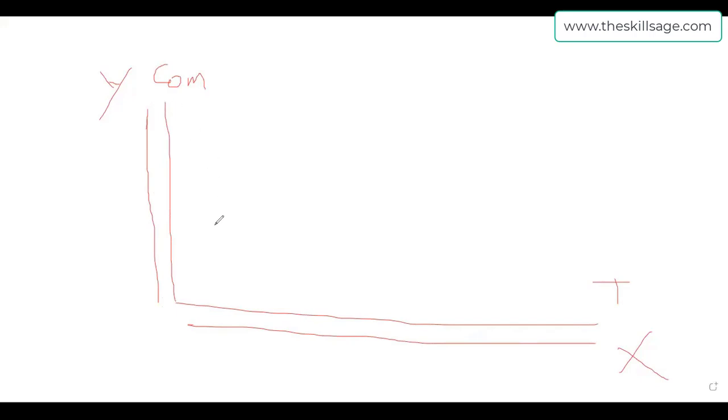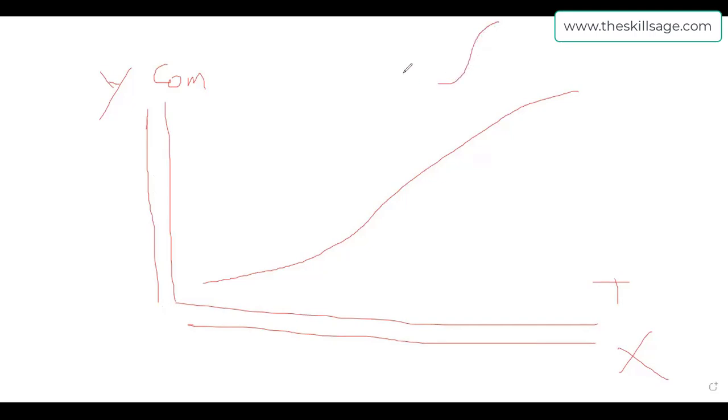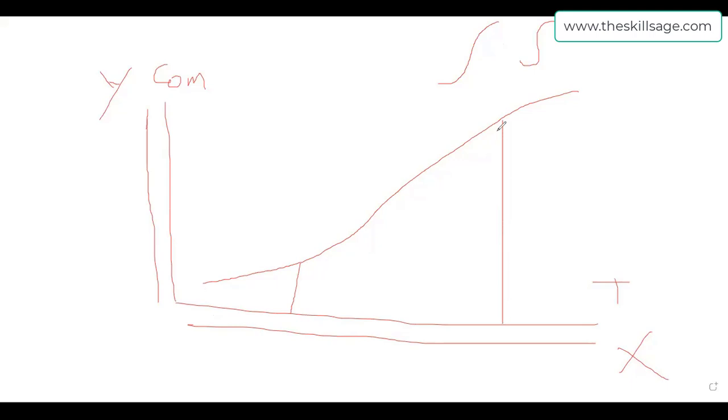When we extrapolate these two data—cumulative progress, cumulative cost, cumulative man hours against time interval—we get a curve like this. This is called an S curve because it looks like an S. It is lean at the start of our project because preparations will not require much work. Once our project reaches this stage, it will be expedited with maximum progress extracted. Then at the end, slower activities will be done with a smaller amount of time and cost incurred.